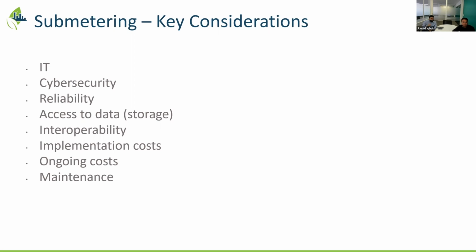If I can add quickly to what Junaid mentioned and the great points mentioned by Amanda: from my previous experience in the pharma sector, where we were installing sub-meters, one of the mistakes typically made from an engineering project management perspective is that key stakeholders like IT were involved in the implementation phase, and by that time it was already too late.